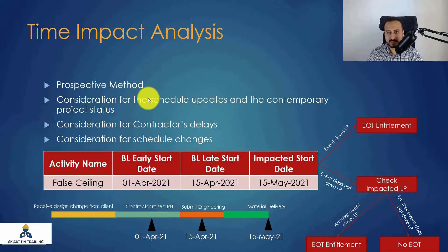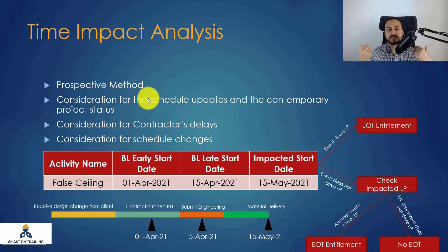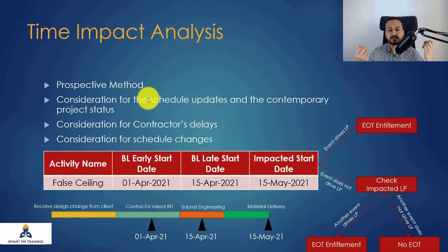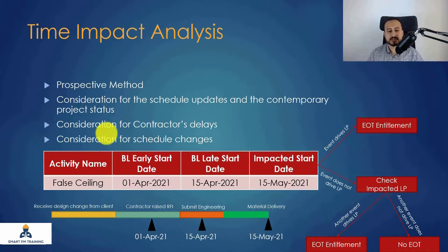They are almost similar. The only major difference is that in the Impacted as Planned I use the baseline schedule, while in the Time Impact Analysis I use a schedule update. Because TIA takes into consideration the contractor's delay and the schedule update status — whether ahead or behind — it is a stronger method.